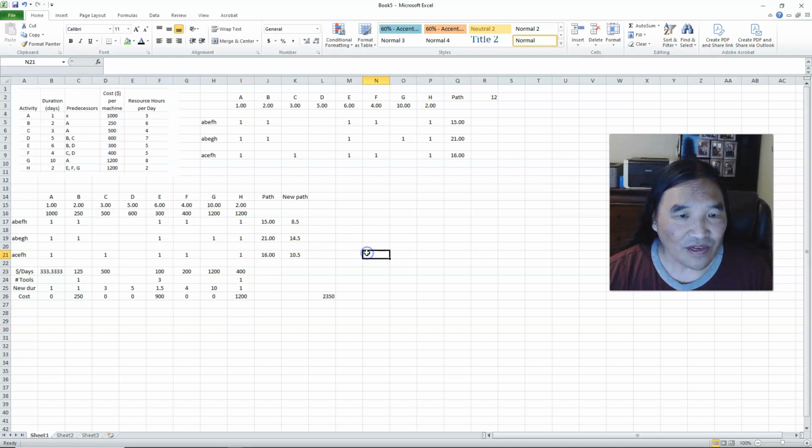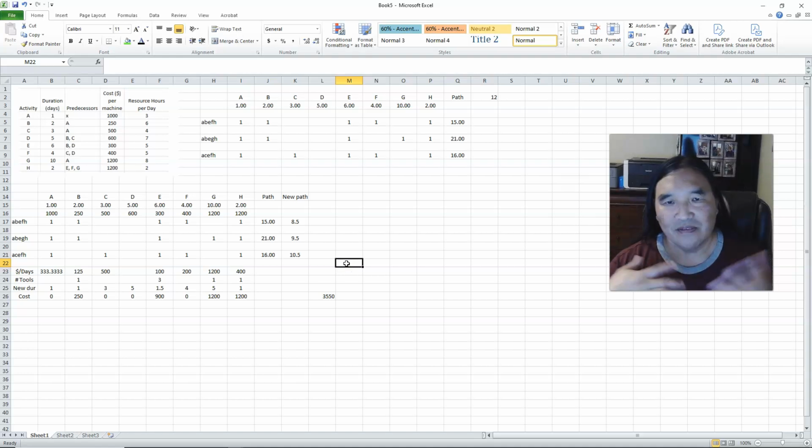And one thing you'll notice is, say I did buy one of these bad boys. What happens? What's my new critical path? It's this guy now. And that often happens. Once you start doing things, the original critical path may not be the new critical path.